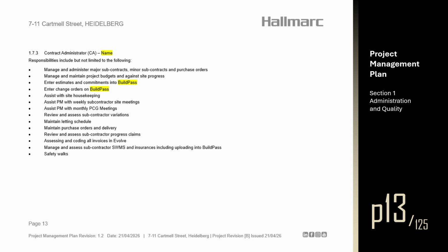Review and assess subcontractor progress claims. Assessing and coding all invoices. Manage and assess subcontractor SWIMS and insurances, including uploading into BuildPass. And safety walks.